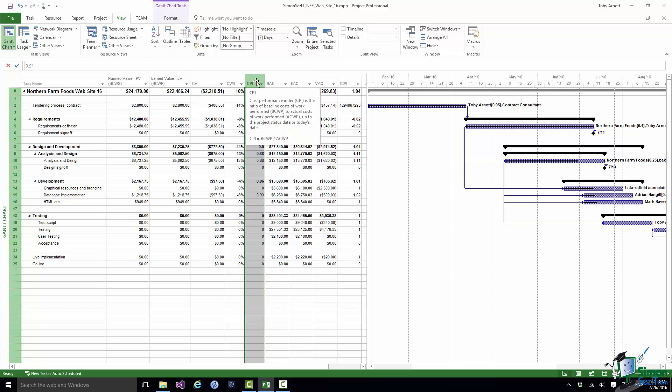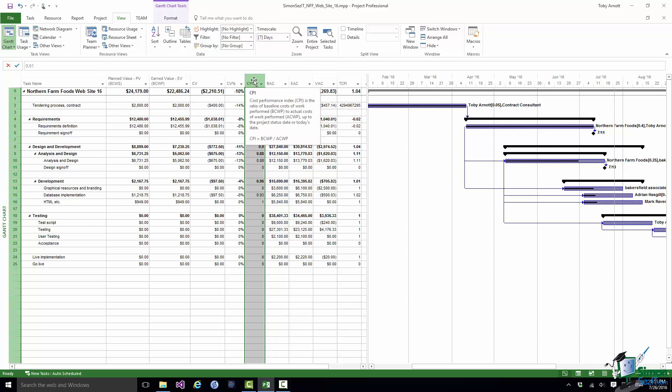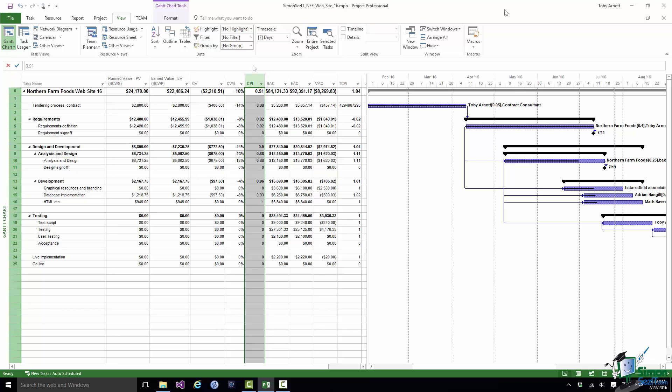The column to the right of that is CPI that I mentioned just now. And CPI is Cost Performance Index. And CPI together with SPI that we're going to look at in just a moment are two very important indicators. For tasks that are in progress or completed we would expect the value of CPI to be 1 if everything has gone exactly according to baseline. In the case here for the tasks that are completed or in progress generally speaking the value is below 1 which is not good and indicates a project that is running over budget, over cost.